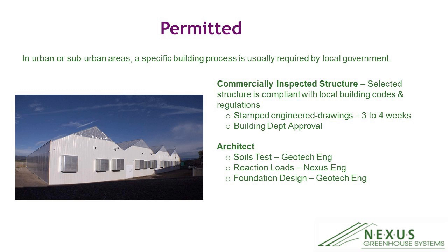Then you'll take those reaction loads along with the soil test, and the geotechnical engineer will design the foundation for the structure. After all this has been done, the architect will typically lay the foundation design on top of the Nexus structural designs and create his own, what I call an architectural layout, and he'll submit that to the city along with your help.